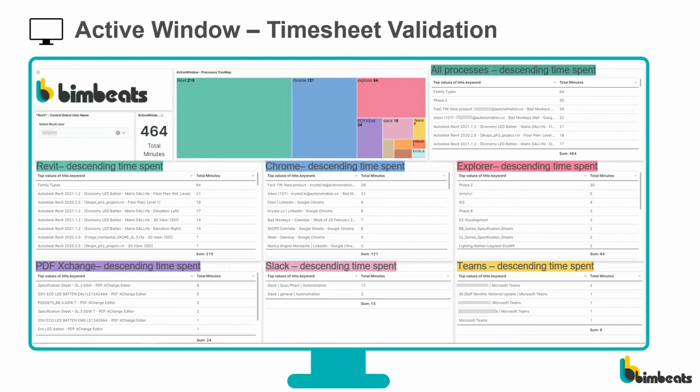And particularly around variations, to be able to say, well, okay, I know how much time I've spent in these particular views. And those particular views were for that variation where the architect moved something, and we need to record the effect of that for us as a business.